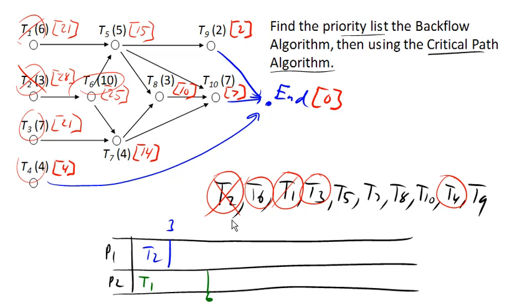we really want to get done as soon as possible because it's holding up these other two. And so we can go ahead and assign task 6 to processor 1. And that's going to take us all the way out to time 13 here.